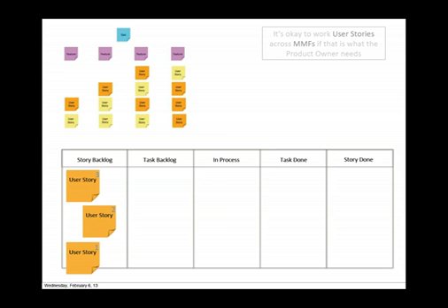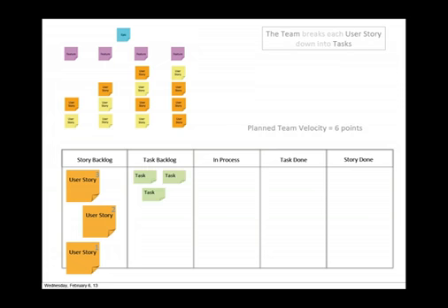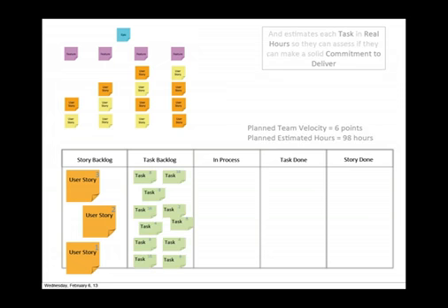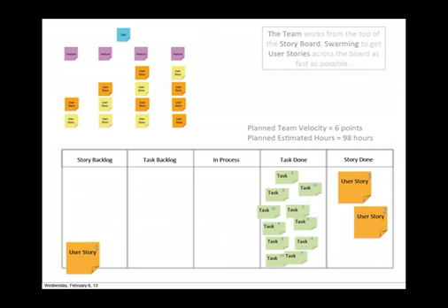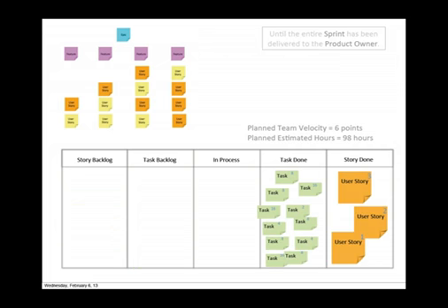When it's a single team project, if our scope is off and our velocity is highly variable, sometimes that's a problem, sometimes it's not. But when we're thinking about 3 to 6 to 9 month roadmaps, we need to focus really hard on the idea that teams need to be able to look at an integrated backlog and nail what their velocity is over time. So, this is all straight Scrum stuff. We're breaking things down into tasks, moving tasks across the board, and swarming around things to stabilize our velocity over time, okay?